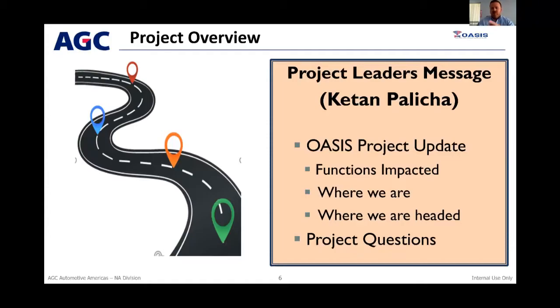Now, one thing to note too, just as a reminder, looking into that October timeframe of the launching phase. We talked about the last two weeks being a forward shutdown, and same with the first week of November. To me, that's a very good goal of implementation. So we can start maybe phasing in at the beginning of October, and then maybe going live November 1st. It has to be a cutoff of a month. So you would recommend. Okay.